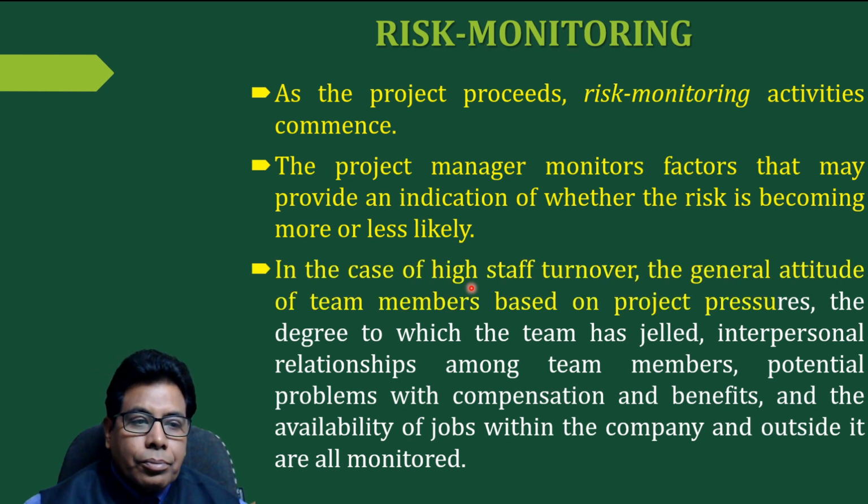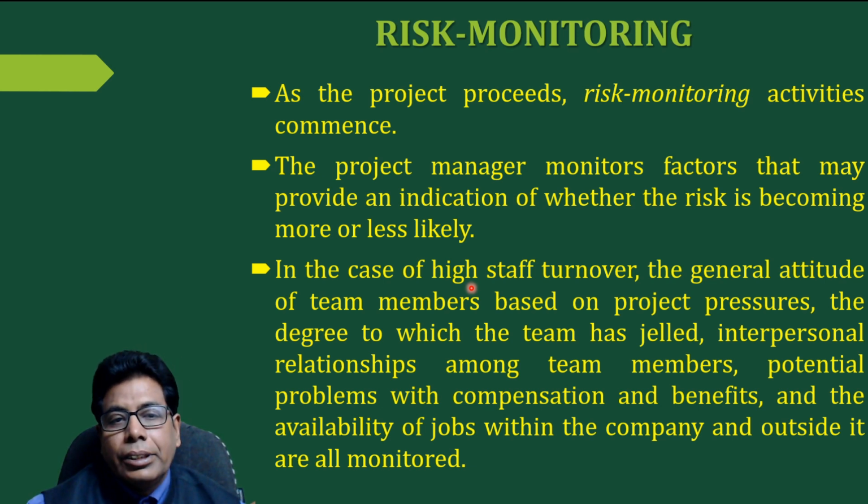So the general attitude of the team members based on the project pressures, then the degree to which the team has, means how they are mixing with each other, and interpersonal relationship among team members, potential problems with compensation and benefits, availability of jobs within the company and outside, all are monitored.